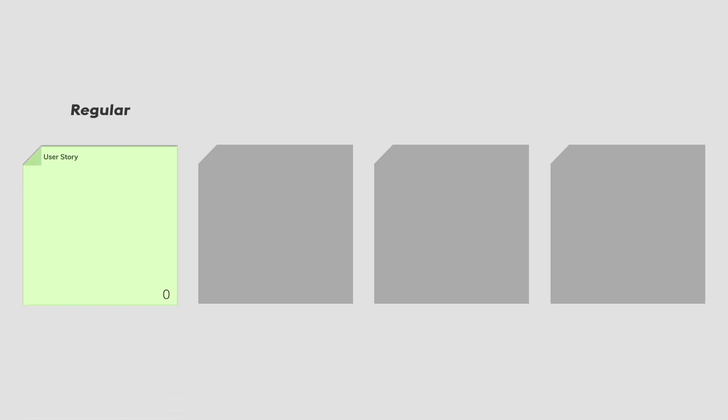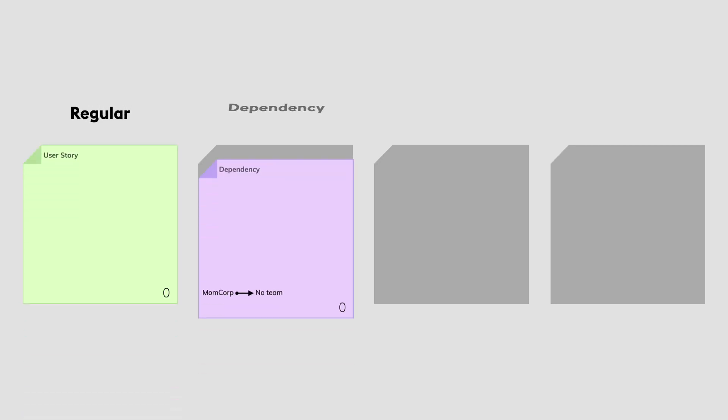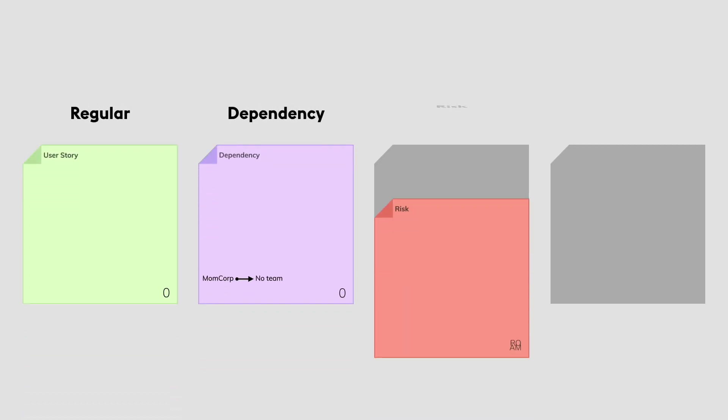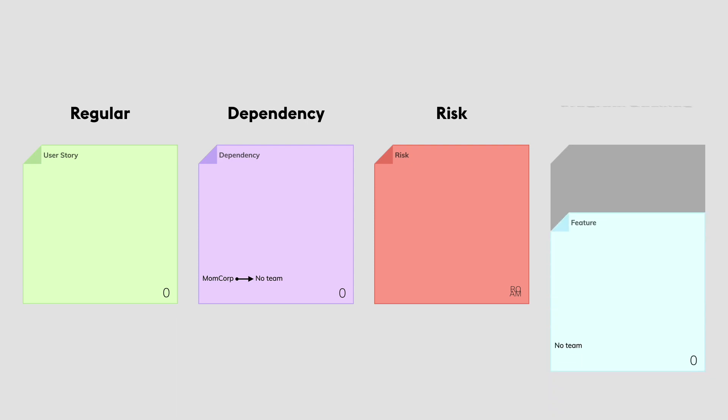First, you need to know that stickies on all boards have the same structure. However, the PI Planning app offers four unique sticky types: the regular one, the dependency, the risk, and the program backlog sticky type.